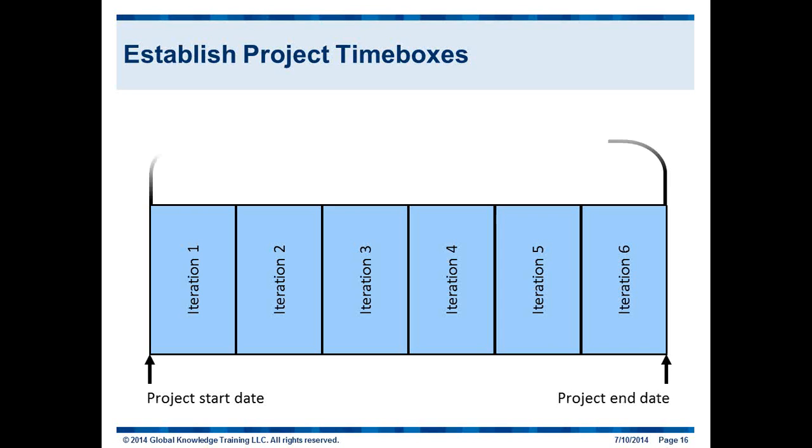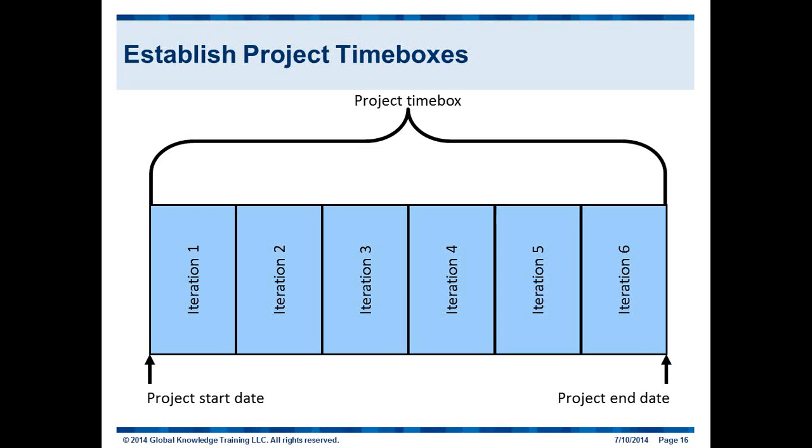In selecting how long we want the sprint to be, it really is a team decision based on how big the user stories are, based on how many people are on the team, but we always prefer shorter sprints to longer sprints. The reason for this is because we want to fail fast to learn fast. If we're struggling in a sprint, if we're failing, we want to fail fast, have that retrospective, get the feedback, learn what we need to learn, and then replan and start a new sprint. Also, speeding up those feedback cycles means we're going to learn more, faster, about ourselves as a team, about our customer, the product owner, and about the product and the technology we're working on. So speeding up those feedback cycles speeds up the learning, and increases our overall quality and performance.